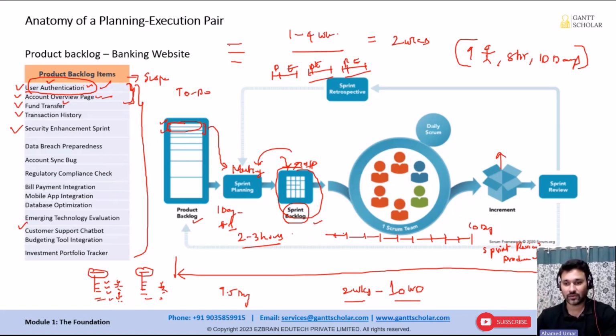If there are any issues, or we didn't do the work correctly, or sometimes after reviewing the done work, the stakeholders will get some inspirations, some ideas. They will share that, okay, go back and add this into the feature in the next iteration. This iteration is over. We're done with the time, the resources. So if anything is to be done extra on top of what we have done so far, we need to move that to the next iteration. You understand? Because we have only half a day left. We're on the 10th day of the sprint. And based on this input, the features will be updated in the next iteration.